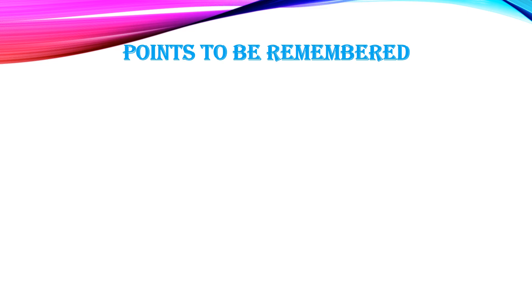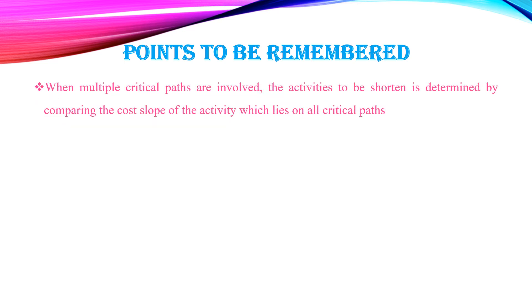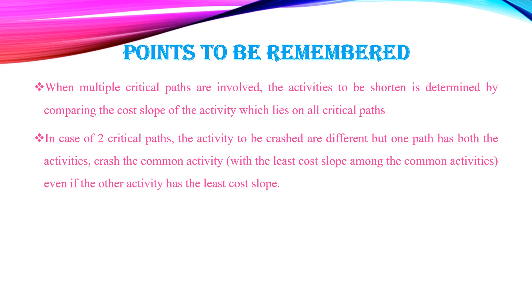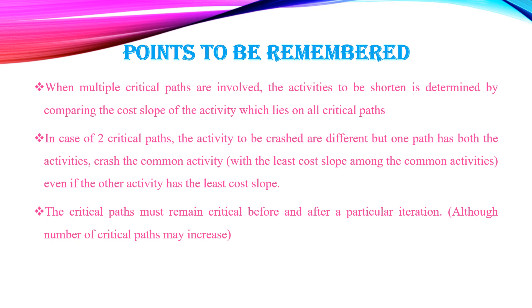Points to remember while crashing the network: When multiple critical paths are involved, the activity to be shortened is determined by comparing the cost slope of the activity lying on all critical paths. If two critical paths exist and activities to be crashed are different but one path has both activities, crash the common activity with the least cost slope. The critical path must remain critical before and after each iteration, although the number of critical paths may increase.